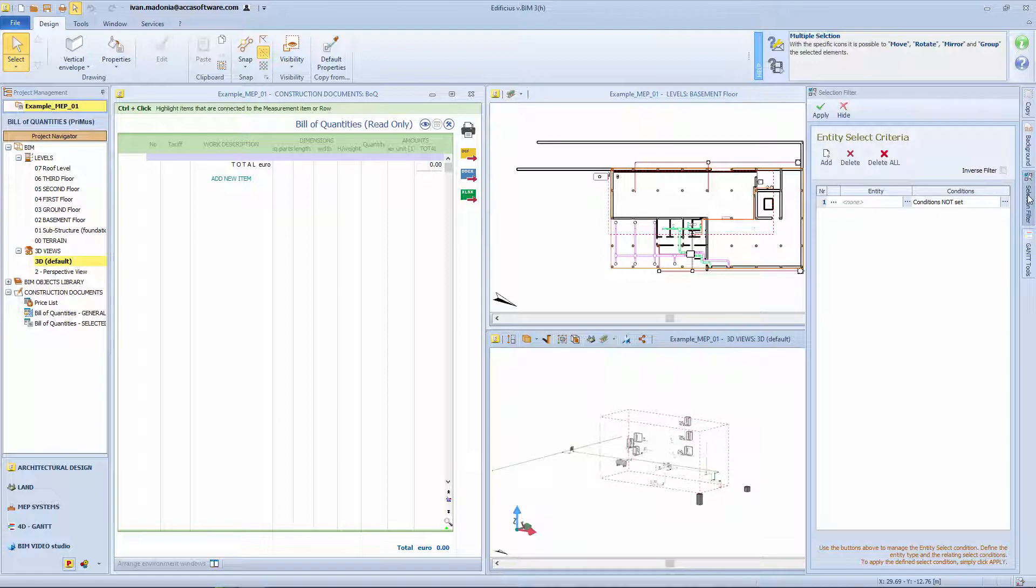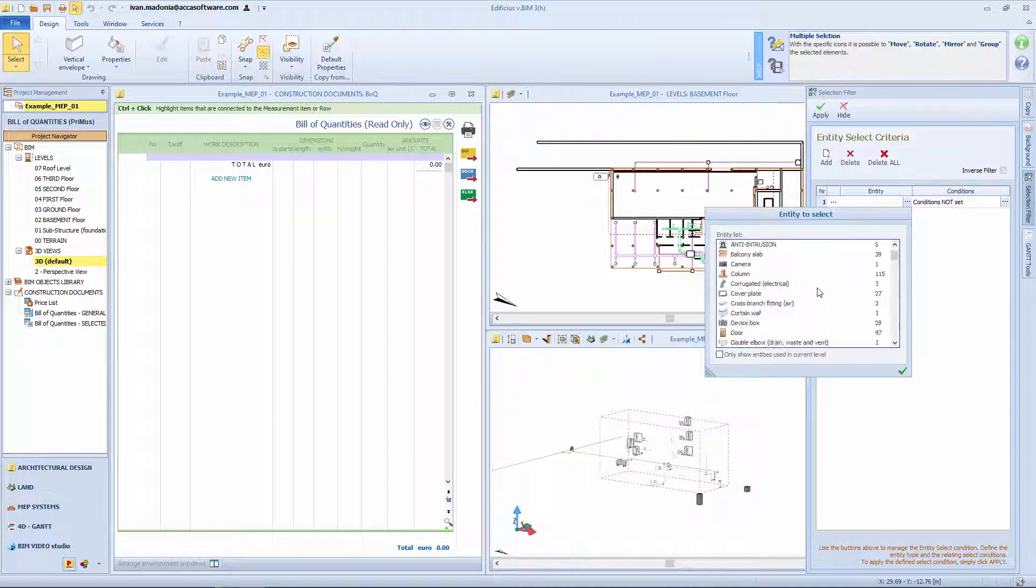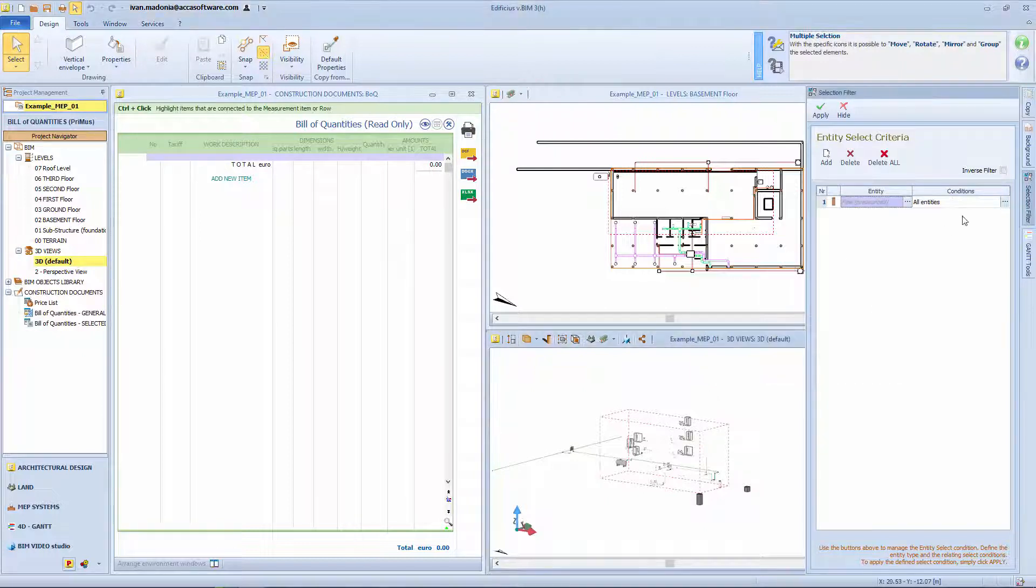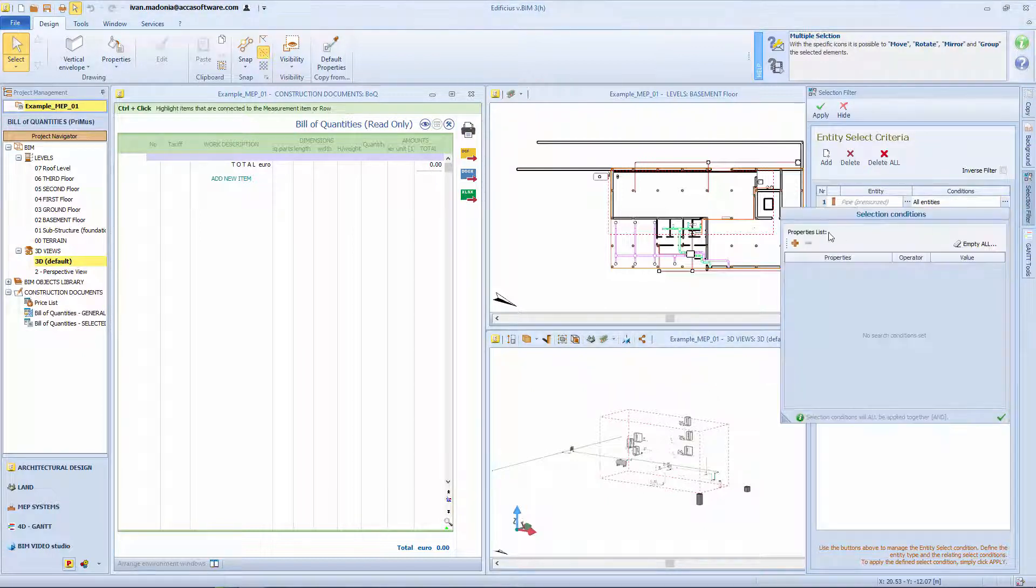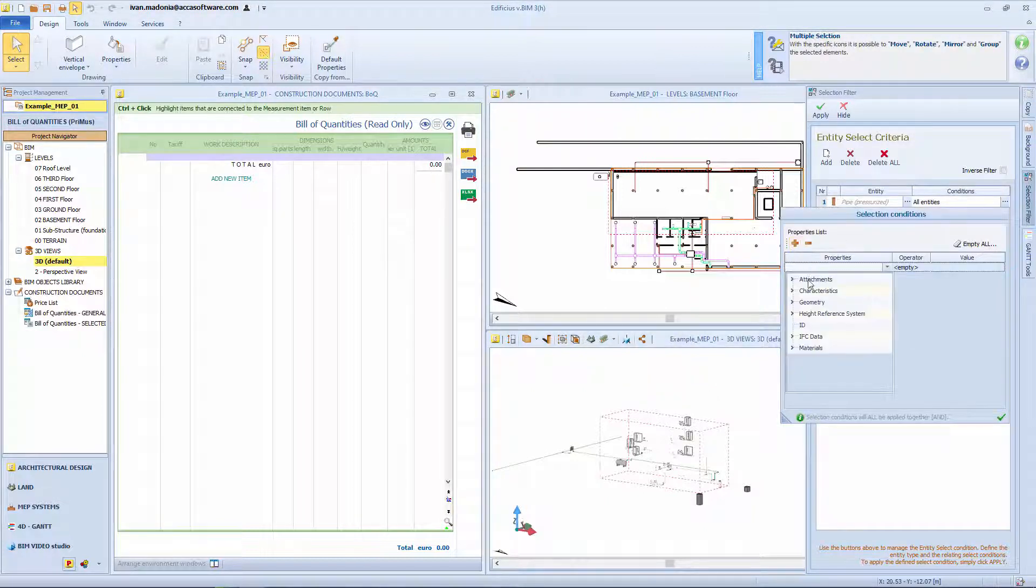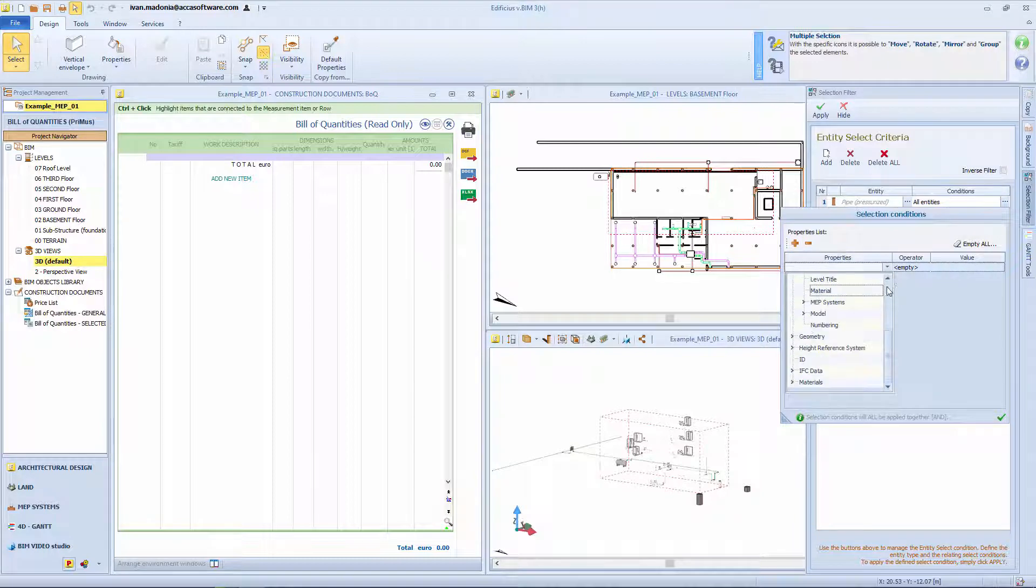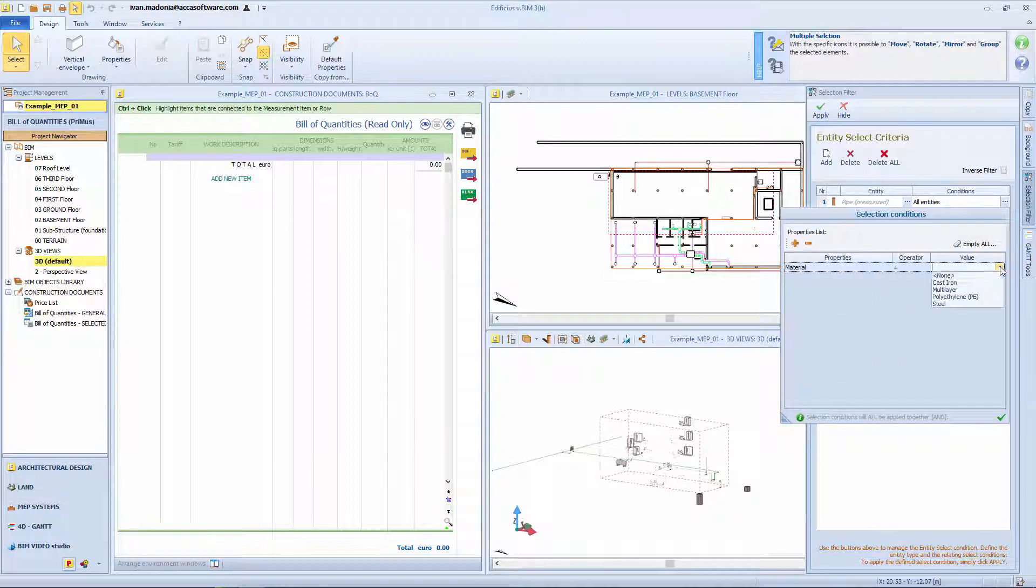By means of the Selection Filter button, you can create an even more detailed selection order to identify elements that meet certain criteria. For example, if you want to take into account only the multi-layer pipes with an external diameter of 20 mm.